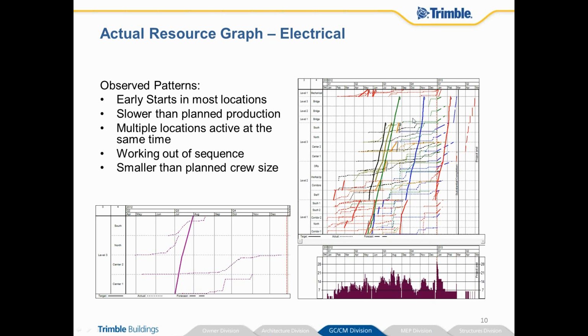When we look at this right-hand flow line here, we've used a resource graph indicating the variability of the actual schedule. Manning up to 14 people 1 week, back down to 10, all the way up to 21, back down to 12, back up to 17. Not only is this incredibly high risk, but it's also incredibly high cost, and somebody's got to pay it.